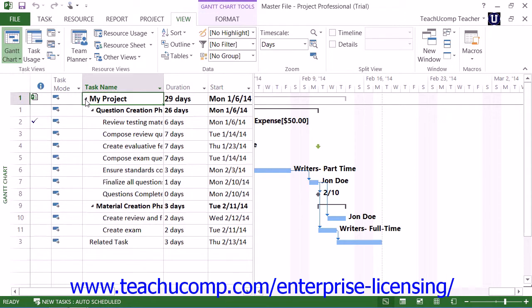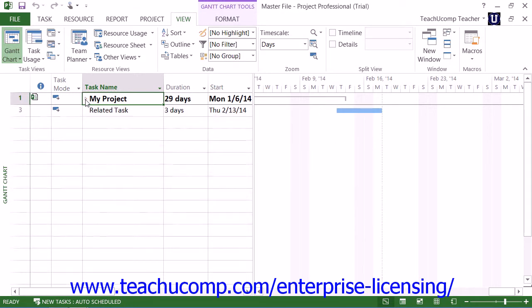Also, since the subproject copies are linked to their original project files, when changes are made to the original files, these changes will then appear in the master project file the next time it's opened.